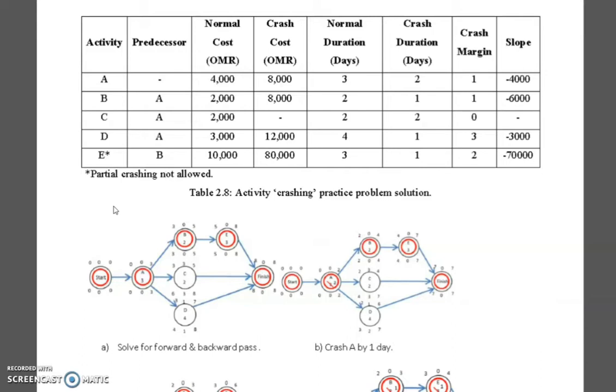على كل الأحوال أنت دافع فلوس الحفار ومنزله عندك في السايت، ودافع الإيجار ماله. اشتغل الحفار أو ما اشتغل فلوسه عليك، أنت مستأجره بالساعة. تمام. فبالتالي لو قررت أنك تنزل حفارين اثنين وتسوي كراشنج للديوريشن اللي هي 3 أيام النورمال، أوتوماتيكلي أول ما تنزل حفارين راح يخلصون المدة الزمنية بيوم واحد. ما ممكن يخلصوها بيومين إلا إذا صار تقاعس في العمل أو عطل أو أنت وقفته، وبالتالي خسرت نفسك. إيش الفائدة؟ فهذا معناه أن partial crashing is not acceptable. تمام.